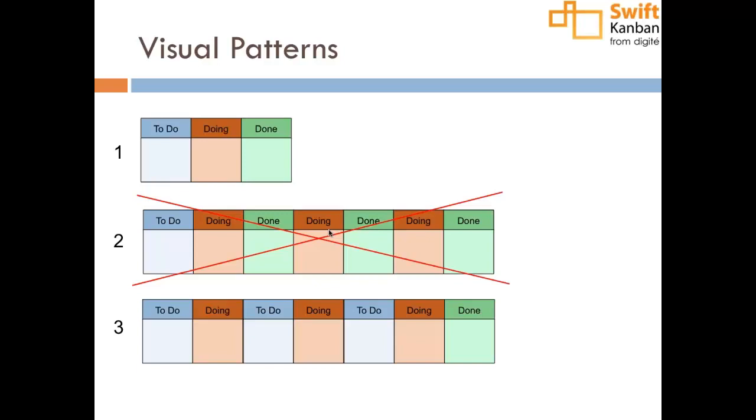So the point is, generally one starts out by modeling whatever they have. If you look at the Kanban write-ups, what you find is the scenario one is the personal Kanban: to do, doing, done. Now when you extend it to multi-stage flows, people tend to do: to do, doing, done, doing, done, doing, done.